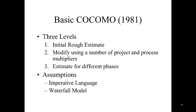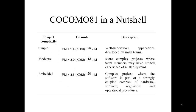Basic COCOMO was made in 1981 and has three levels: an initial rough estimate, modified using project and process multipliers, and estimation for different phases. COCOMO 81 assumes an imperative language and the waterfall model. For a simple project: person months = 2.4 × KDSI^1.05 × M. Moderate: 3.0 × KDSI^1.12 × M. Embedded — complex projects where software is strongly coupled with hardware, regulations, and operational procedures: 3.6 × KDSI^1.2 × M.